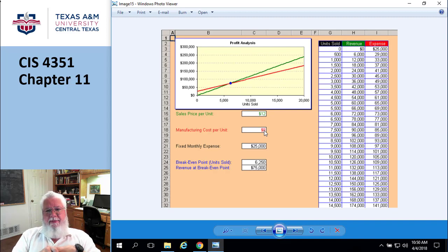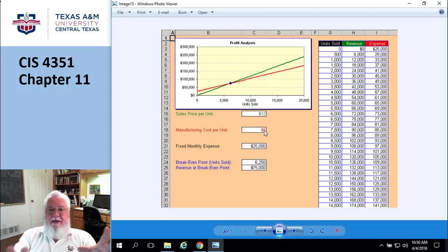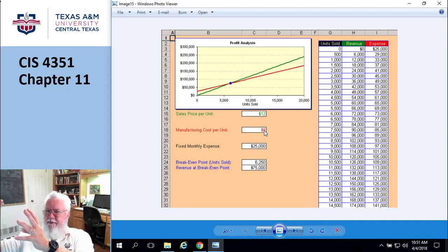So transference would basically mean I don't host my web anymore. I have a third party do it. So I go to a web service provider and say, I want you to host my web. I transfer the responsibility. Now, clearly the risk has not changed. There's still a risk of somebody breaking into the website. The difference is it ain't your job to do it anymore. So transference basically means passing the buck. So sure, the same amount of risk occurs, but now it's my hosting provider's job to provide the security, not me. Cool. All right, so I kind of like those.